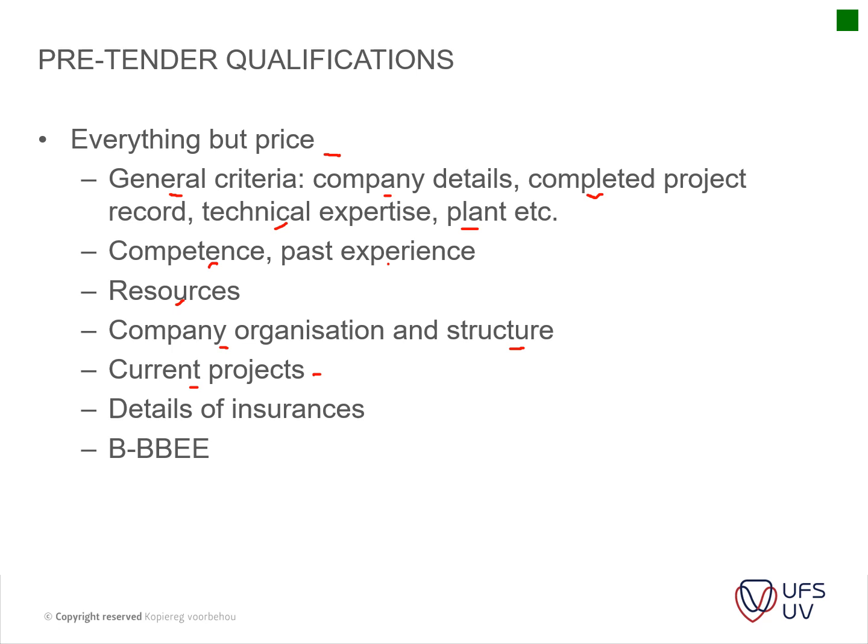to assess if you're on the consultant side. What you try to do from the consultant side, obviously the contractor will say that he does have the capacity, although you will have to check whether that is the truth or not. So a bit of background checks and phoning around a little to find out. If you're in a small community, like for instance in Bloemfontein, it is easy to know what the commitments are of certain contractors, also if you've built up a bit of a relationship with them. And then you've got details of insurances. Do you have the necessary insurance in place? Is your BEE status in place? Your CIDB grading? All of those technical items.